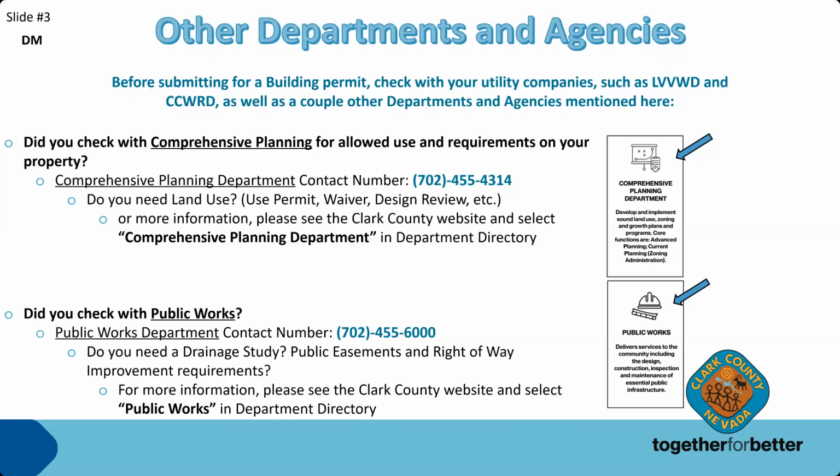You'll also want to reach out to your utility companies like Las Vegas Valley Water or Clark County Water Reclamation. Sometimes they place a condition on the permits and will need to be signed off prior to issuance. So you want to check with them on what their requirements are.